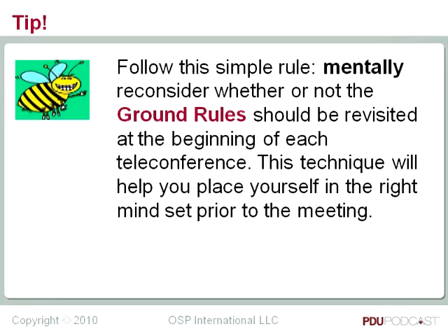And what are your tips when it comes to ground rules? Well, Cornelius, there's really only one tip, and that is to mentally reconsider whether or not the ground rules should be revisited at the beginning of each meeting. You might find out that they need to be or they don't need to be. But what this technique does, it helps you place yourself in the right mindset prior to the meeting. You will make a judgment. And if this is, like I said, a daily meeting, it might not be necessary to do that. Or maybe every fourth or fifth meeting, or whenever someone new comes in.